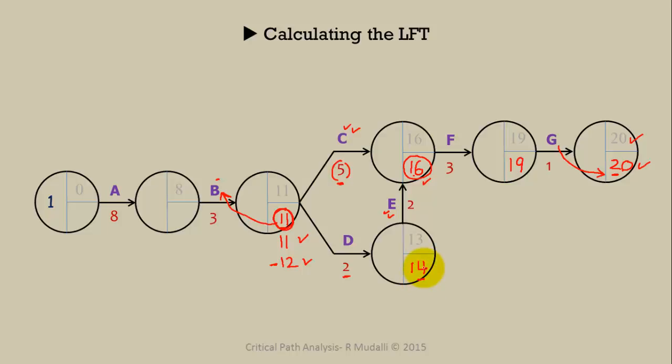So when we calculate the LFT in this instance, we need to choose the lowest value. And we know well for EST it was the highest value.